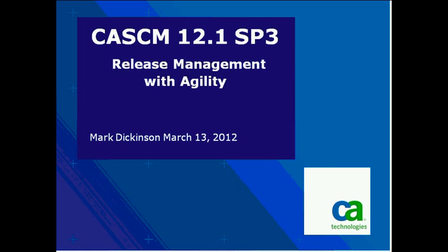Additionally, when you deal with products, there are product launch and introduction activities such as documentation, user acceptance training, marketing, and distribution, and they're usually dependent upon more traditional plan-driven scheduling that you would get out of project management, such as Clarity. The result is that for many IT organizations, they have to manage a blend of waterfall and agile projects in the development process, some of which have inter-project dependencies.